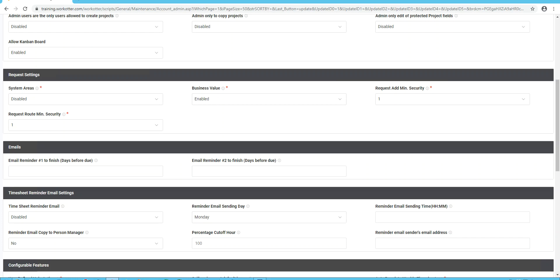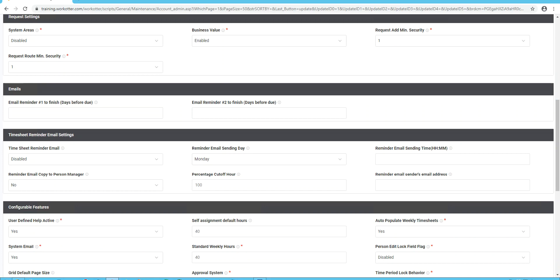These are the reminder feature built into WorkOtter. So when there's an issue, a task, a risk, a deliverable, you can set up a couple reminder emails, up to two. So this supports an integer value, and this will email them anything that's incomplete, x number of days before it's due. So if you wanted to send someone an email three days before it's due, you would type the number three.